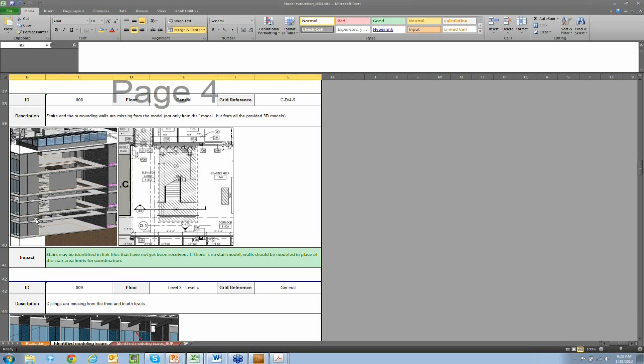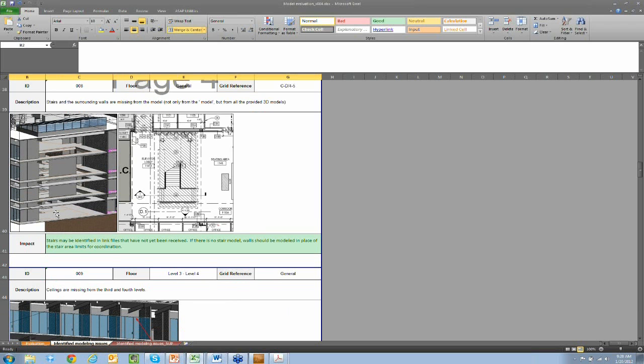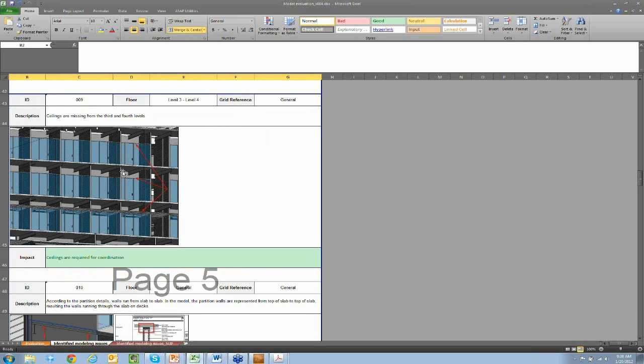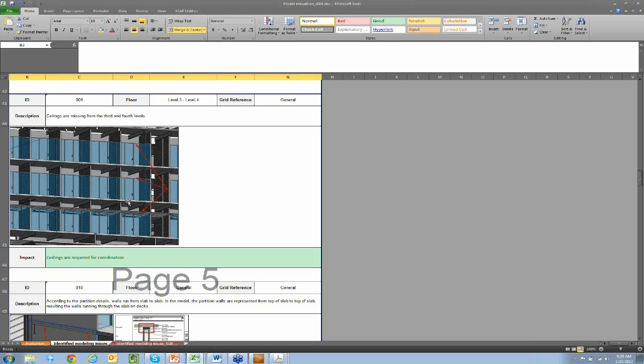And for the purpose of standpipe modeling, we want to make sure that this stairwell is represented properly inside of the BIM model before we proceed with coordination. We check all the ceilings to make sure that they're there, that they're matching the elevation they're supposed to be according to the 2D drawings, and then also the thickness. You may just have a sliver for a piece of drywall in some ceiling models. But in reality, if that's a GWB ceiling, you need a three and five-eighths inch stud, or maybe if it's an ACT ceiling, you're going to need an inch and five-eighths for grids. So that's the kind of spatial stuff that we look at.